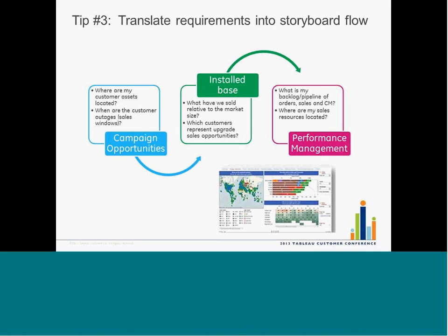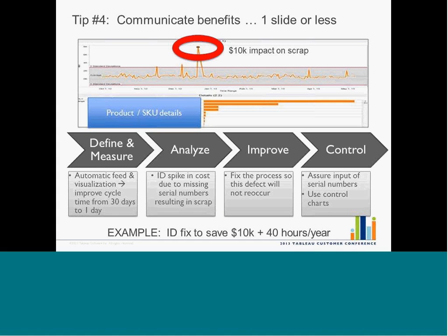And we did that to keep things as simple as possible to communicate, but more importantly, it keeps us grounded in terms of what we're trying to do. One of the things that we're very conscious about is scope creep. So if we have a request that sounds reasonable, we have a lot of really good data, it's already there for us to put in the dashboard, but it doesn't fit the narrative or the storyboard, it gives us a check. It makes us test ourselves to make sure that we're not adding something that might not necessarily be necessary.